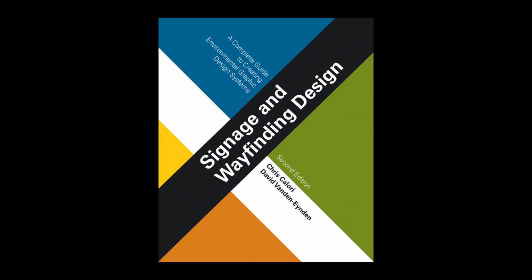As in Phases 2 and 3, it's important to focus on the sign program's information content system in the early stages of the documentation phase. It's time to nail down every last sign location and message because, inevitably, a few will still be left open from the DD phase. Only when the sign locations and messages are finalized can the details of the sign graphics and hardware be finalized, as resolution of these visual aspects of the program is contingent on the quality, kind, and viewing conditions of the information displayed on the signs.